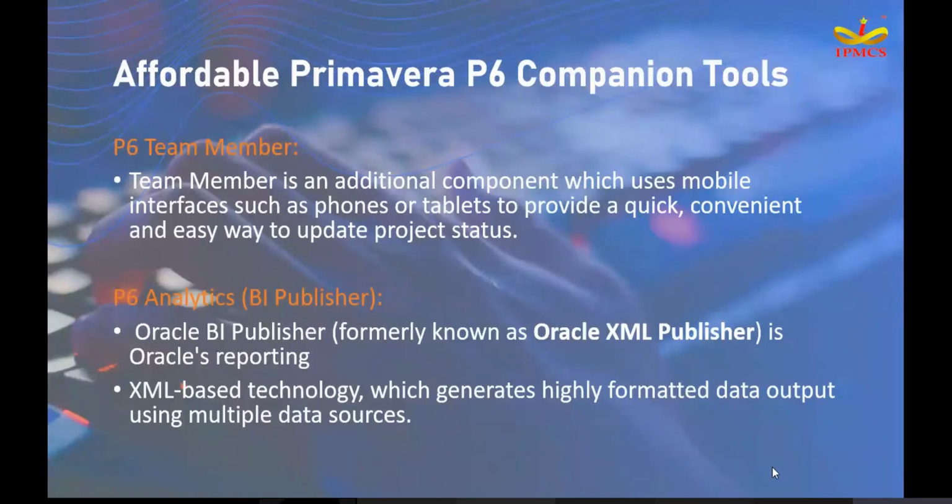P6 Team Member is an additional component which uses mobile interfaces. Apart from the normal web-based solution, in Team Member we also have three different modes of updation. One is a mobile application for Android users, another is a mobile application for iPhone users, and a browser application is also available. Mostly the site team will feel difficulty accessing the system, a laptop, or internet connections. In this case, they can easily use the mobile application to update the status.